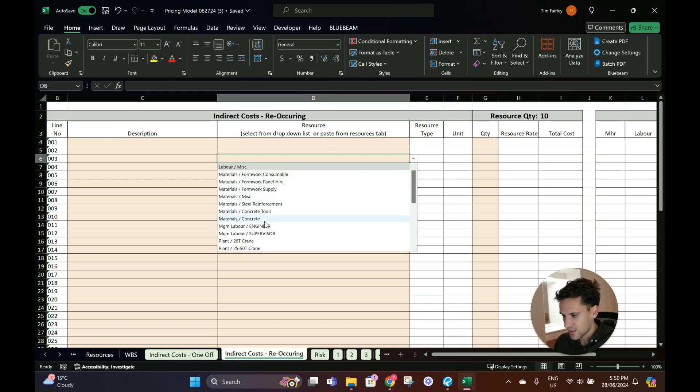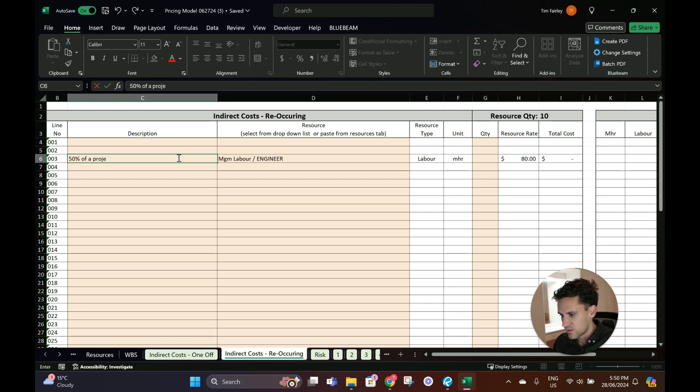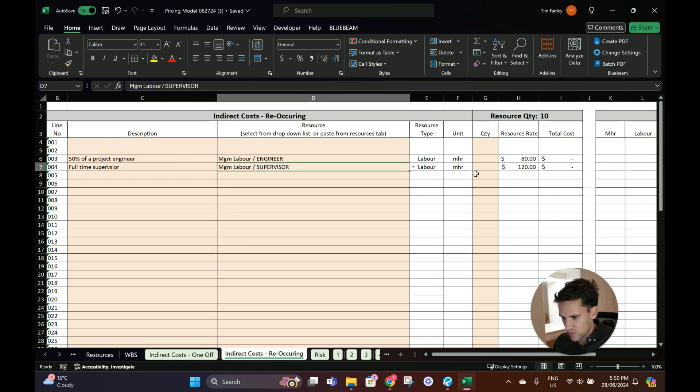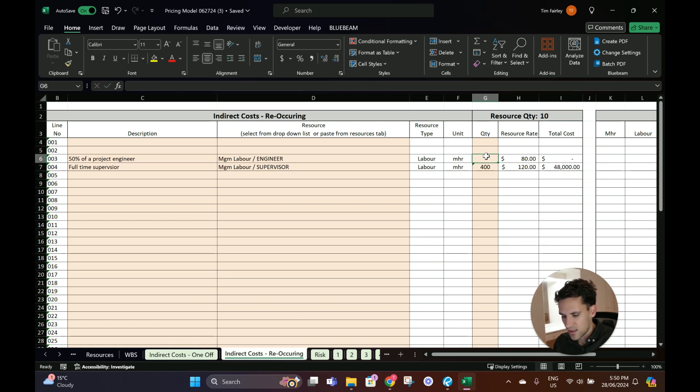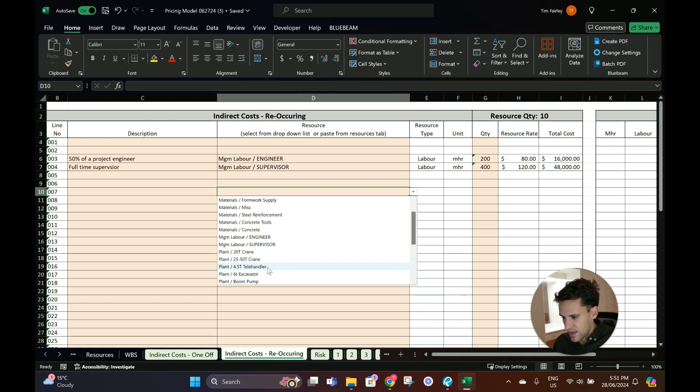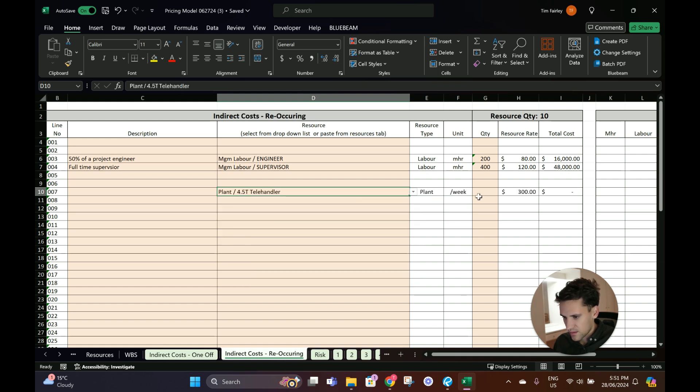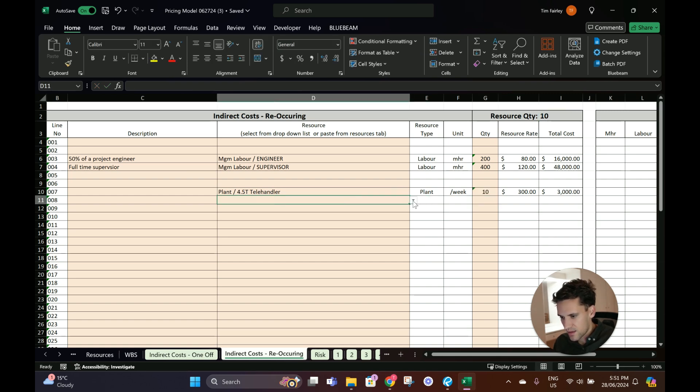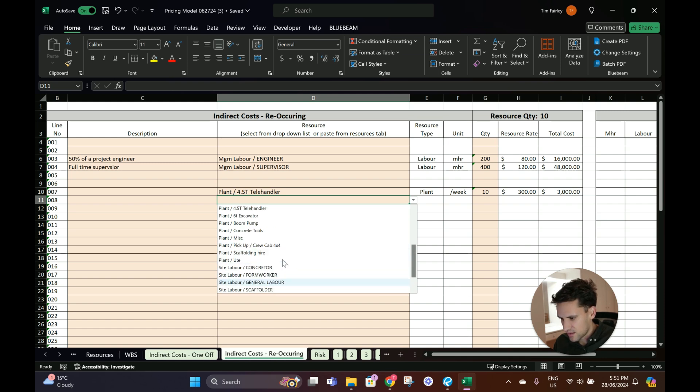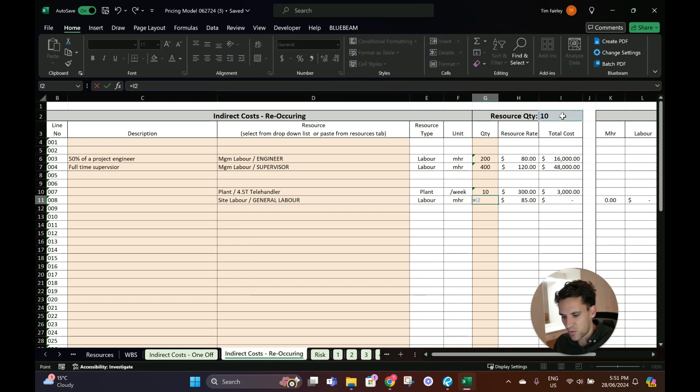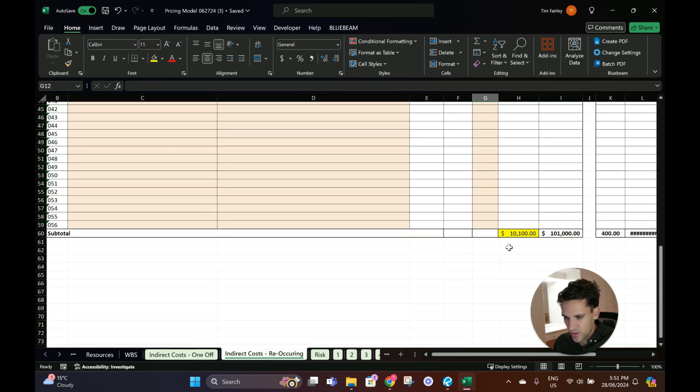Recurring indirect costs - we've got a 10-week construction program, so basically what are the resources we're going to be using? Maybe we got 50% of a project engineer and a full-time supervisor. So 40 hours a week, 10 weeks, so 400 hours. And let's say 20 hours a week for 10 weeks. Maybe we have a telehandler for 10 weeks and operator. That's coming out to us $100,000 in recurring indirects.